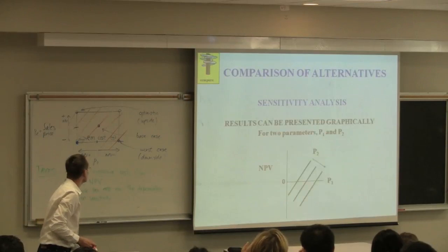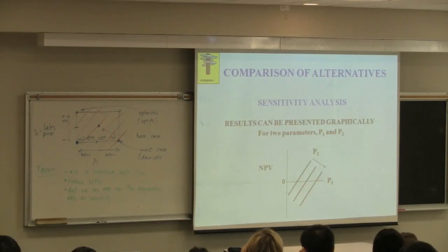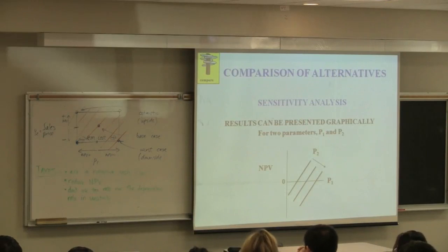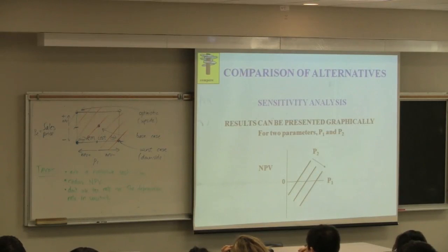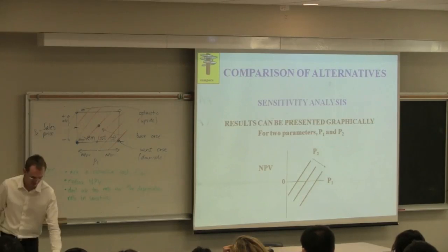Okay? So working with these ideas of fractional factorials and factorial design, especially when you go to 3 or 4 or 5 uncertain parameters, which for a realistic cash flow you're going to have, we can handle that quite nicely using ideas of experimental design and fractional factorial. So you establish your NPV for a limited number of combinations, and then make sure that at least for most or all those combinations, your NPV is positive, which would be desirable. Okay, so that's just a quick recap of where we've been.